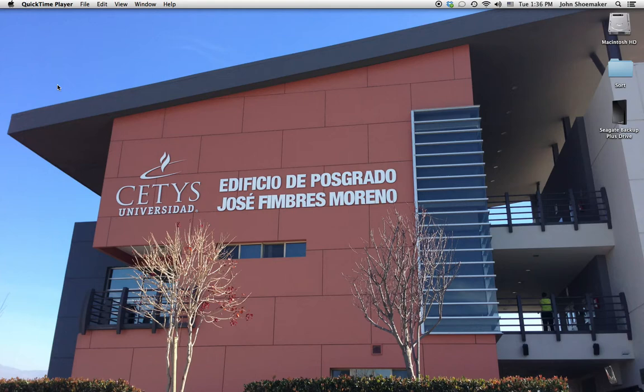to understand. Let's talk about the process that we use to manage risk, especially during the planning stage of a project. Essentially, risk planning has four stages. The first is risk identification. The second is risk documentation. The third is risk analysis and prioritization. And the fourth is risk response planning. Let's go through each one of these one by one.